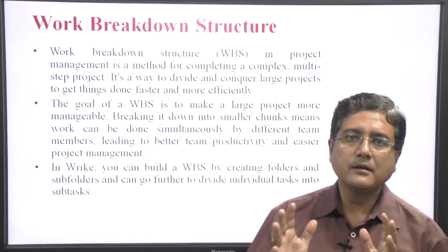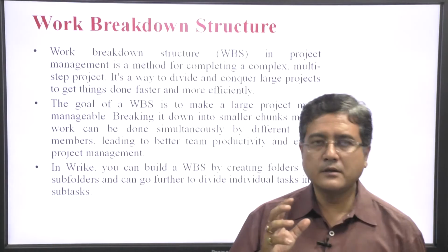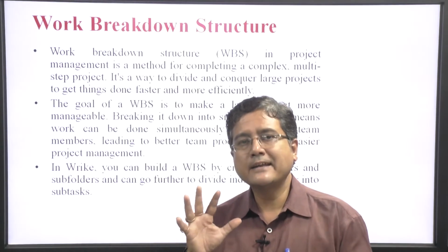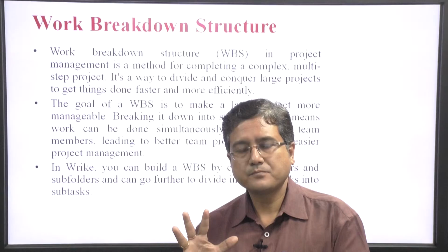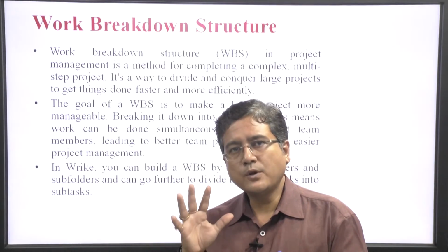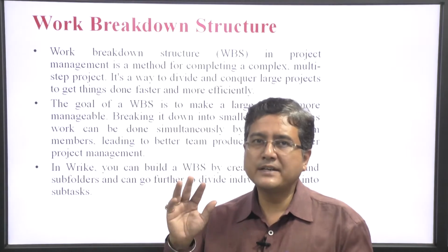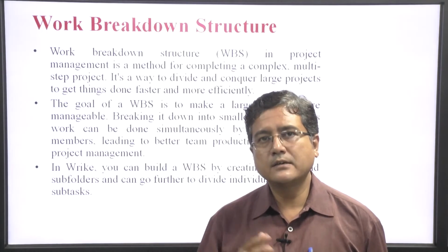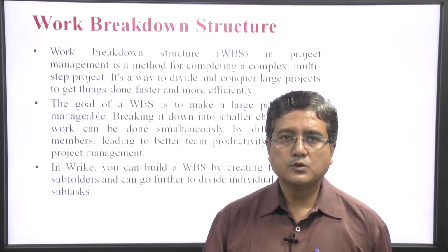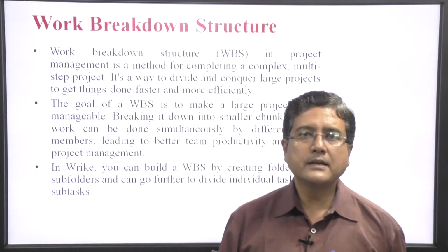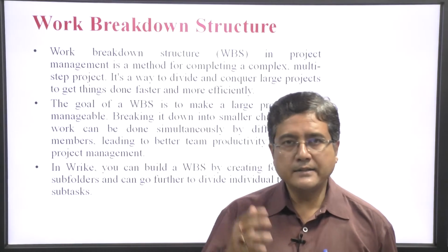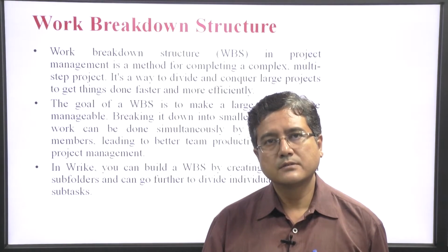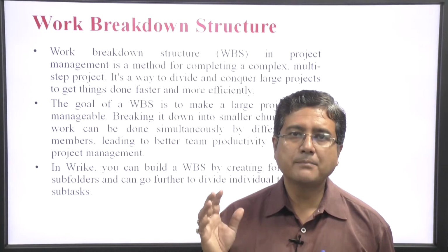Let us take an example of electrical work in any project. It is not only electrical work, it is wiring, fitting, connecting the things, all related to each other. So, we can further break down the electrical work into these subsections: inside wiring, outside wiring, under pipe wiring.